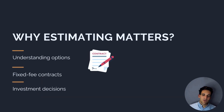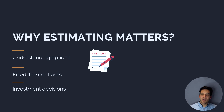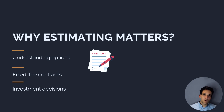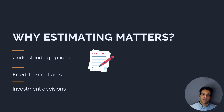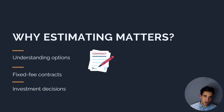Estimating also matters for several other reasons on construction projects. The first is it helps us understand different options. Say we're managing the design of a project and we have to decide between installing multiple distribution boards on street lighting or installing one distribution board. The central question is which option is cheaper. The only way we can know the answer is to estimate the costs.